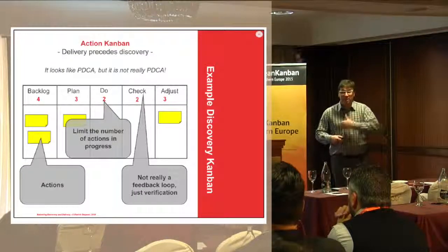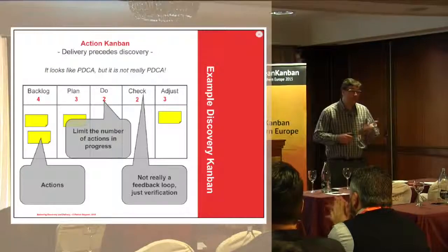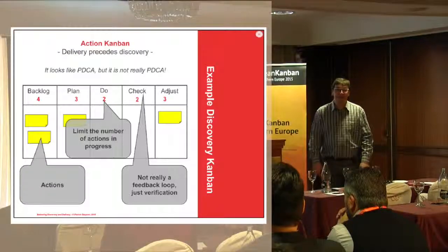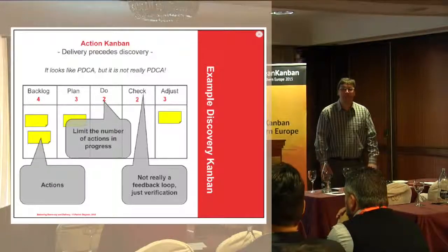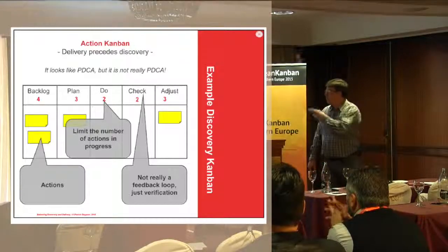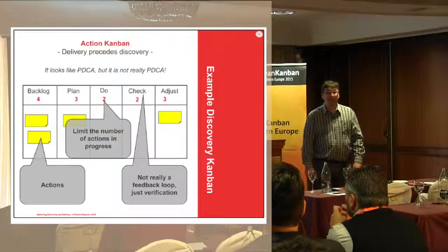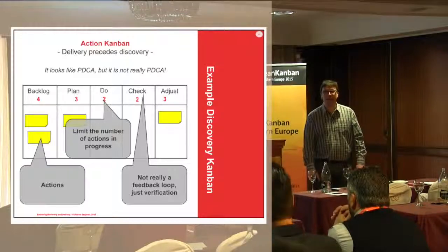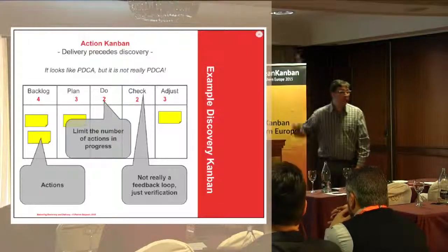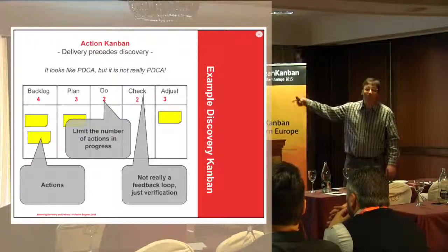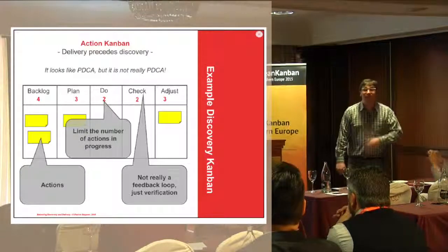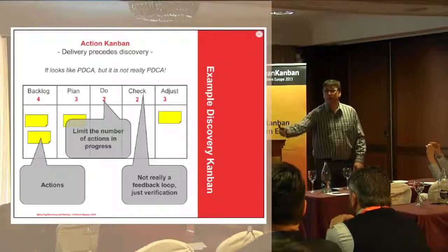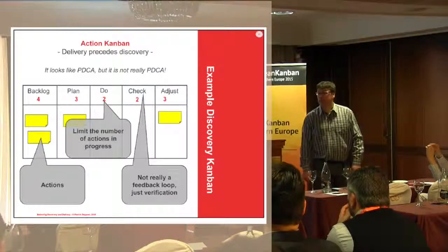Now, the best type of Kanban that I've seen and that I think is relevant in this case is just an action Kanban. It's just executing actions. Most of the time I see many organizations using a PDCA Kanban for this purpose, plan, do, check, act, but it's not really a PDCA Kanban. It's just an action Kanban. It's not experiments that are managed on this Kanban board. It's just actions. We plan an action, we execute an action, we verify whether that action has been executed properly, and if not, we adjust.